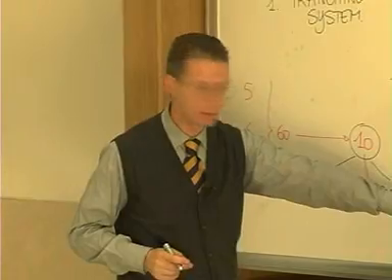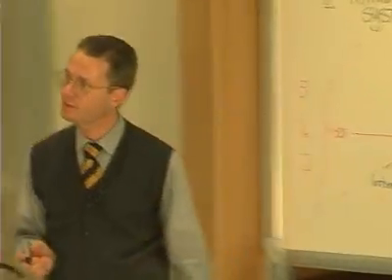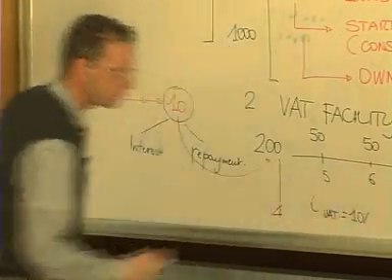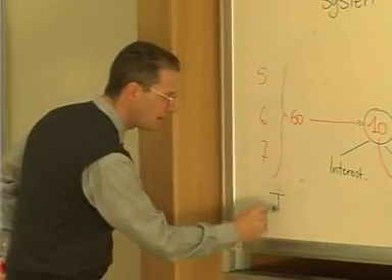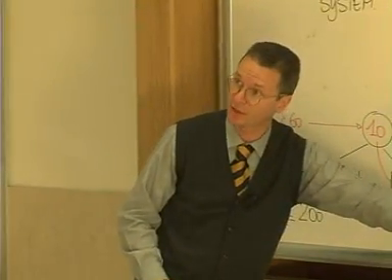And so, in order to calculate the amount of loan that is repaid in year number 5, for example, you have to make one simple additional calculation, and the additional calculation is this one. Suppose that the value-added tax facility yields an interest rate of 10%. So every year you have to pay 10% interest. So I on value-added tax is 10%. Since the interest is calculated on the outstanding amount at the end of the previous period, I know that the outstanding amount of loan at year number 4 is 200. And so interest on 200 is, on a yearly basis, 200, the outstanding amount of loan, times the interest rate on loan, 10%.